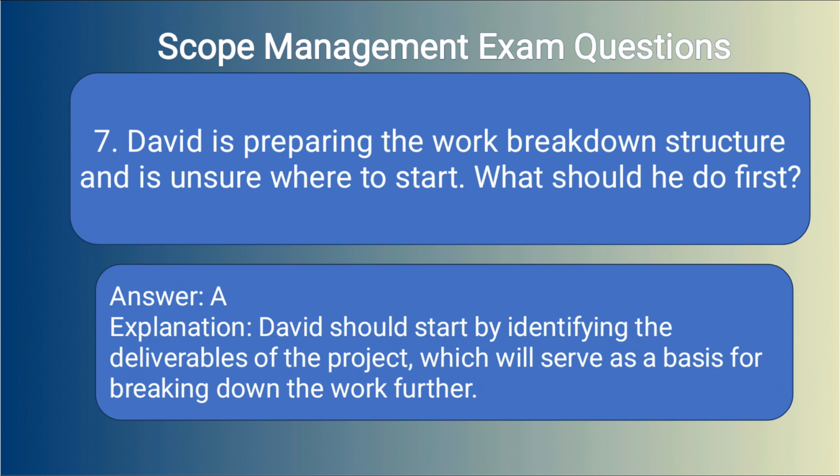Answer A. Explanation. David should start by identifying the deliverables of the project, which will serve as a basis for breaking down the work further.